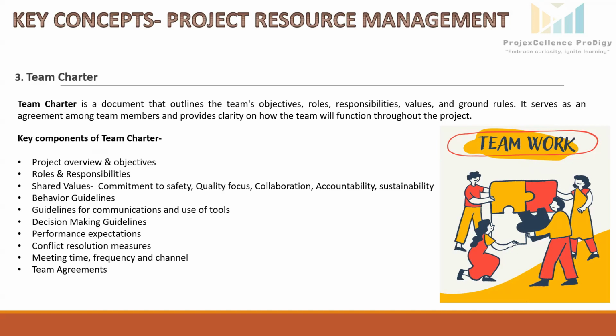Team charter is normally developed by the team only, or at least each member has some contribution in its making. Key components of team charter. What should be included in it? Project overview and objectives means brief description of the project, like installation and commissioning of a 20 megawatt solar power plant project. It will contain high level goals and deliverables, roles and responsibilities. It will define each team member's role and clear delegation of responsibilities to avoid any kind of conflicts.